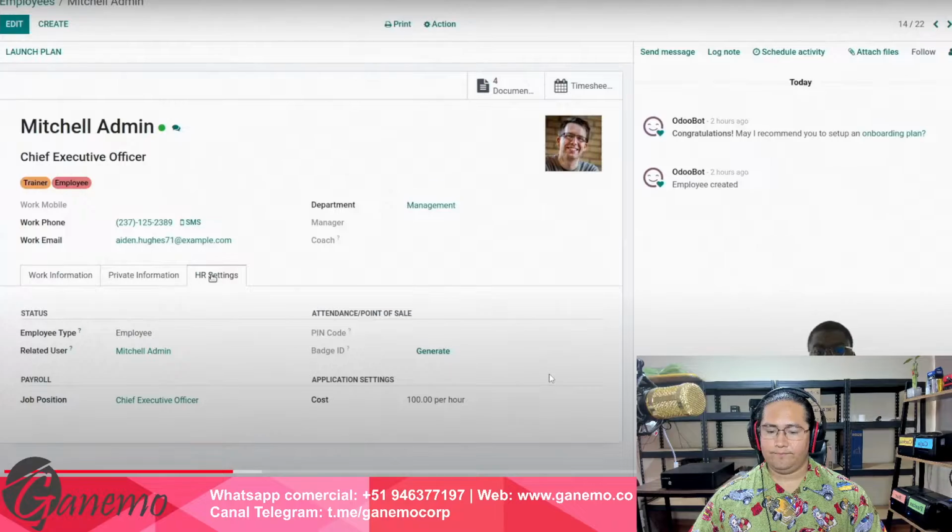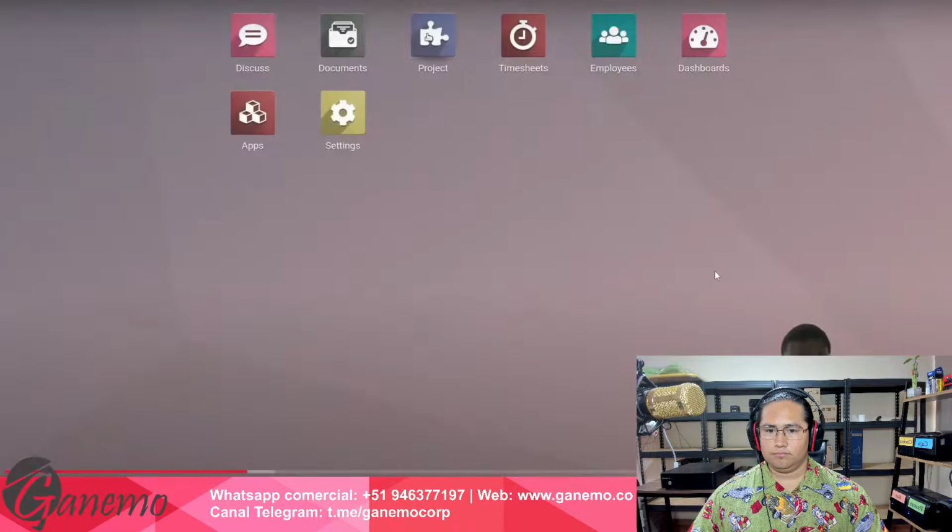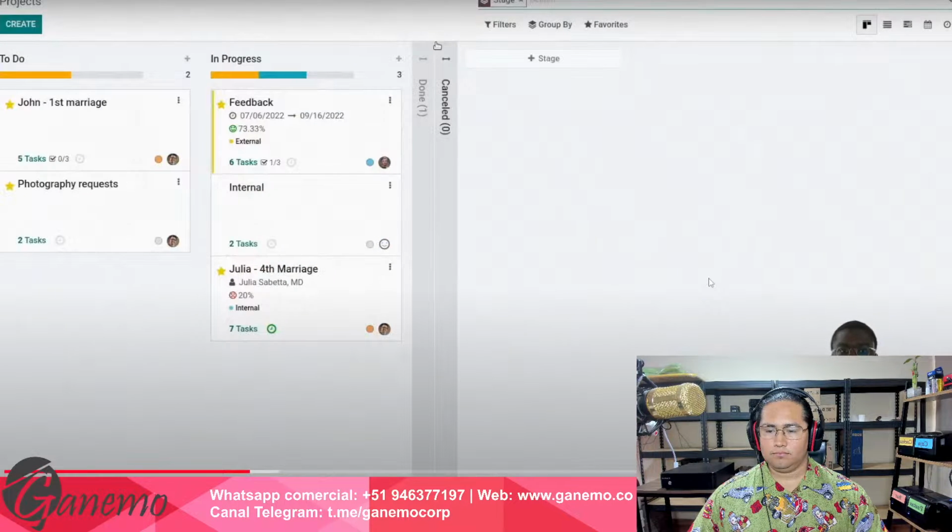That will be inputted within the project. So, because I cost 100 euros per hour, sorry, and I spend four hours on the project, then the cost will be 400 euros, of course. And those are things that we can automate with Odoo just by people timesheeting their work. So let's directly go into the project, and let's go a little bit more in detail about the client-based projects.